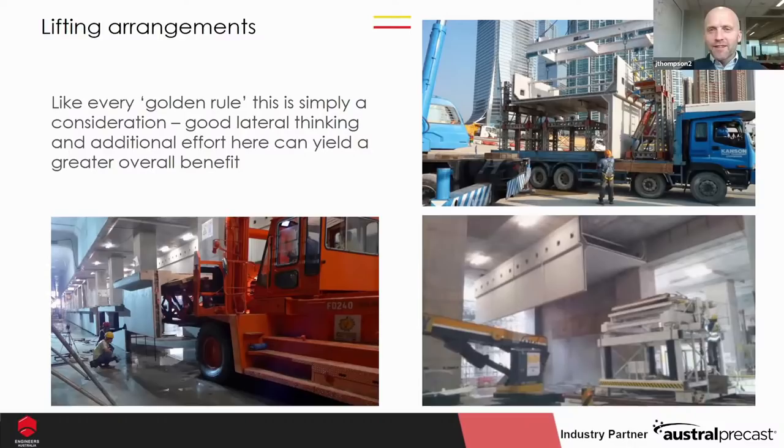This one here, you can see the lifting frames that we used for those OTU units, but they were quite adaptable, so that was probably worthwhile, and they were quite fragile. They're only 200 millimeters thick or thereabouts. Bit of innovation down on the B4 level when replacing the precast platform units, we used an adapted four container kind of level forklift system, and that was really effective and fast, and those units flew in at about the rate of 10 a day, so 35 linear meters of completed platform easily every day with each piece of plant we had.